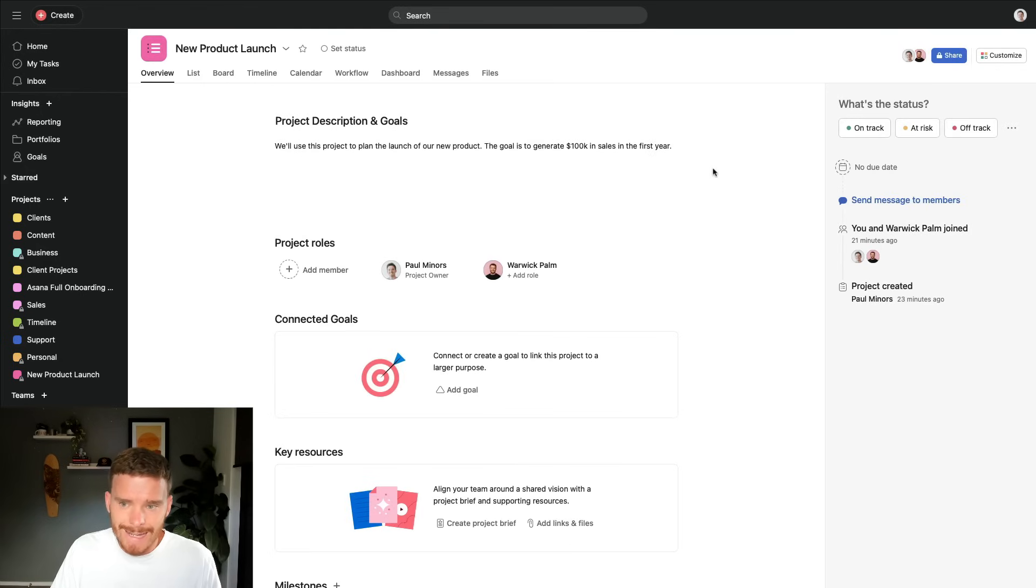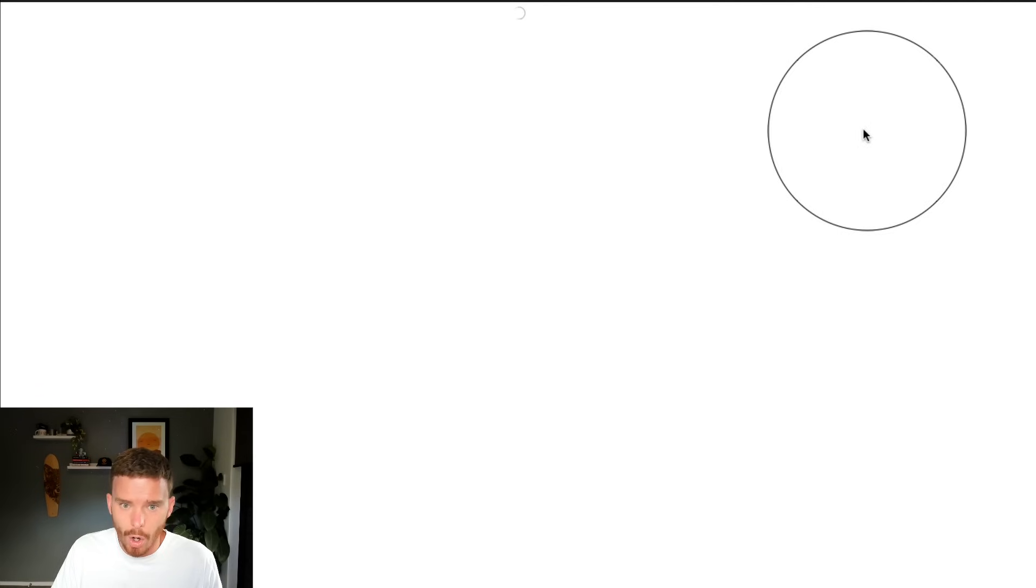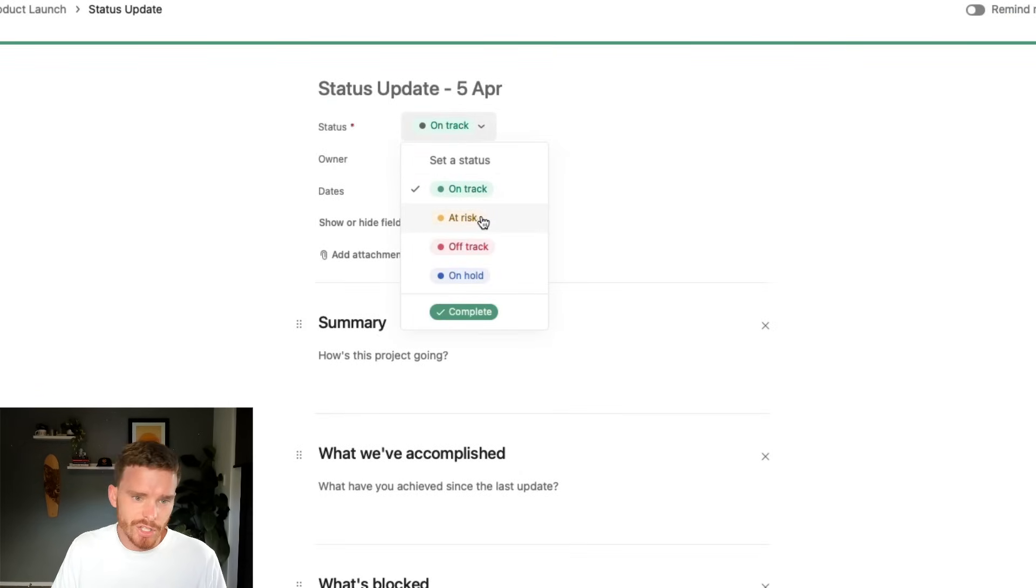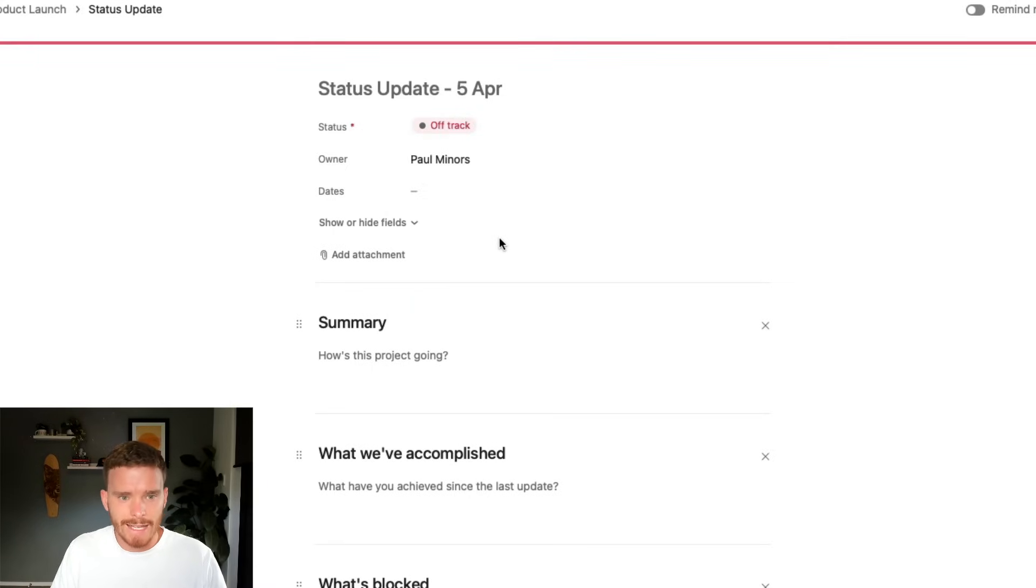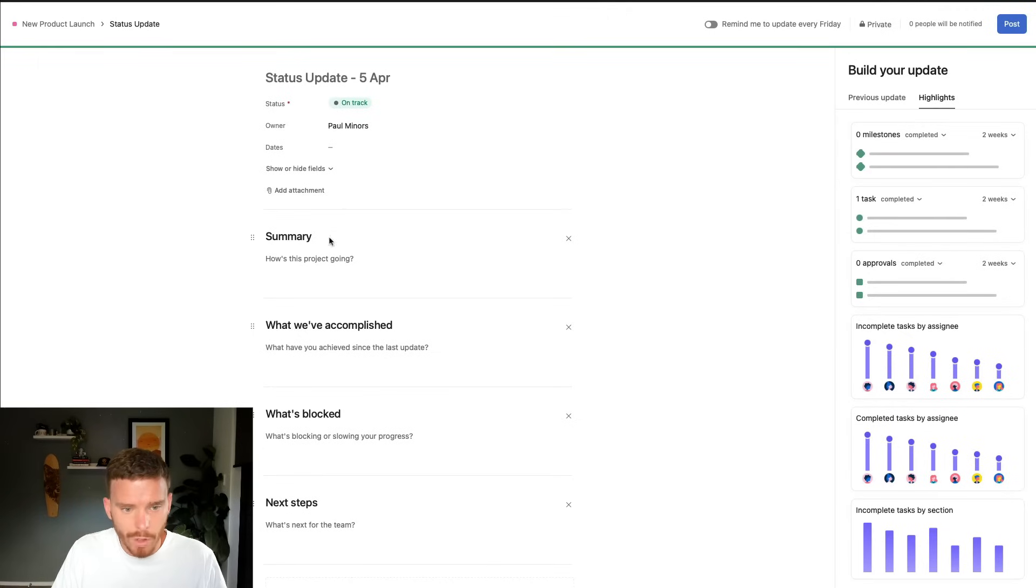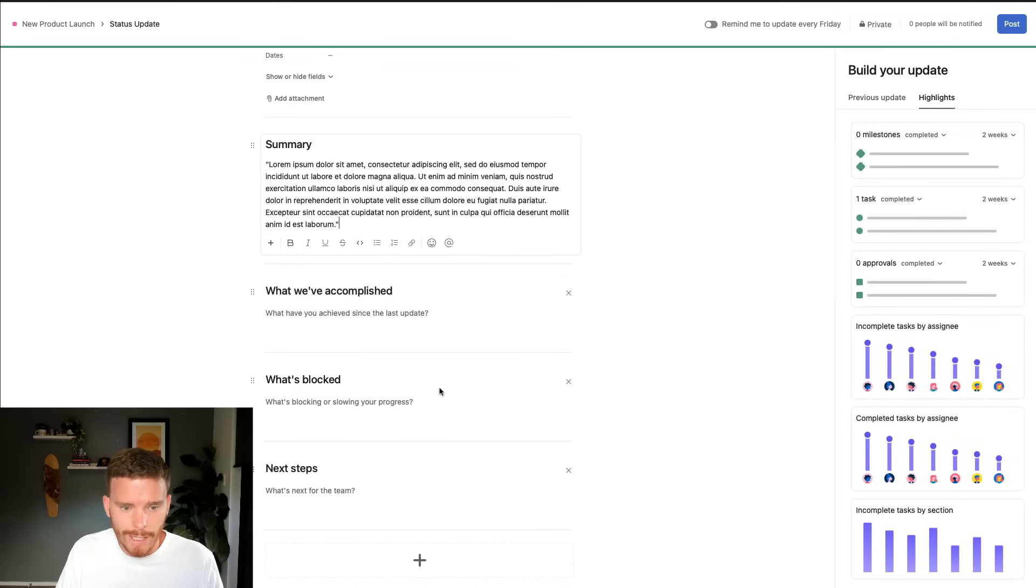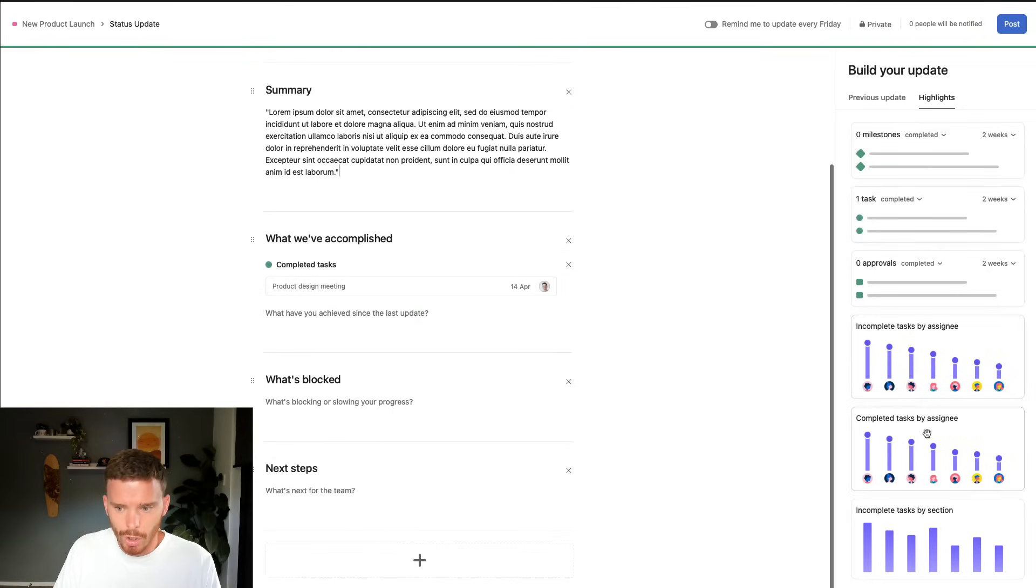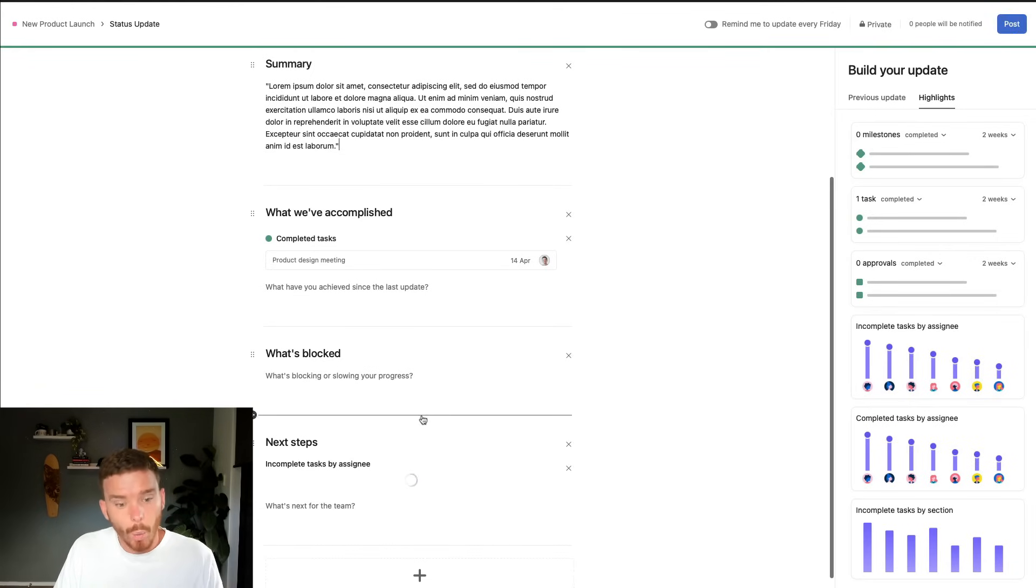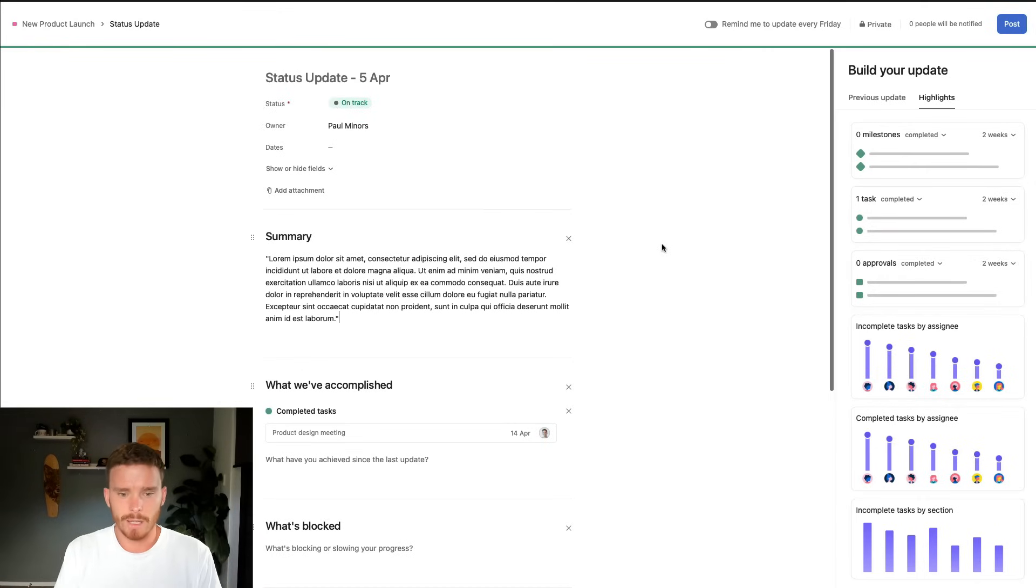And as you progress through the project, you can post a status update on the overview page. You can set the status of the entire project as either on track, which generally implies that the project is going well and you're meeting your deadlines. You can change the status of the project to at risk if you're maybe falling behind a little bit or off track if you're really behind and the project needs to be seriously looked at. So I can set my status up here and I can post a more of a qualitative update. I can write a summary about how the project is going. I can talk about what we've accomplished recently, what's blocked, what we're working on next. And Asana does give me some useful highlights that I can bring in here if I want to report on what we've recently accomplished or what we still have left to work on. And so when I post this project update, this is going to get shared with the members of the project. So everyone is kept in the loop about how the project is going.